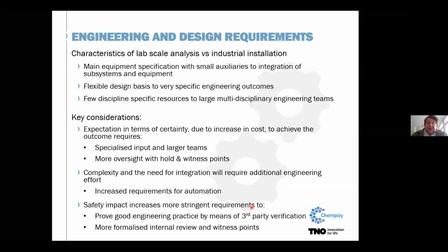In that also, of course, as you need to build larger and larger scale-up units and must be able to show the engineering outcome, your resourcing changes. So where you start off with maybe a few discipline-specific resources that maybe know the technology well, as you scale through the technology, of course, you are looking at larger and larger teams, and ultimately it can be a full multidiscipline engineering team that supports a project manager. And if the team really gets large, you can even look at engineering management. So really large integrated teams.